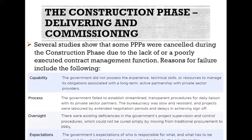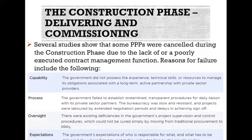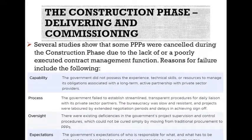Reasons for failure include the following. Capability: the government did not possess the experience, technical skills, or resources to manage its obligations associated with a long-term, active partnership with private sector providers. Process: the government failed to establish streamlined, transparent procedures for daily liaising with its private sector partners; the bureaucracy was slow and resistant, and projects were labored by extended negotiation periods and delays in achieving sign-off. Oversight: there were existing deficiencies in the government's project provision and control procedures, which could not be cured simply by moving from traditional procurement to PPPs. Expectations: the government's expectation of who is responsible for what, and what has to be delivered by when, failed to match the understanding by the private sector.